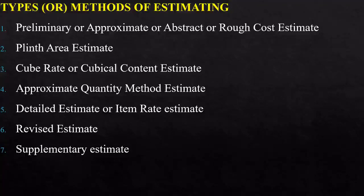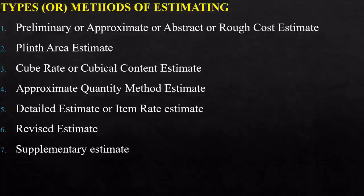The seventh type is the supplementary estimate, which is also a detailed estimate. It is prepared when additional works are required to supplement the original work — for example, to include the latest technologies that have come into force during progress of the work, and for which no prior permission was obtained. In that case, we go for a supplementary estimate.